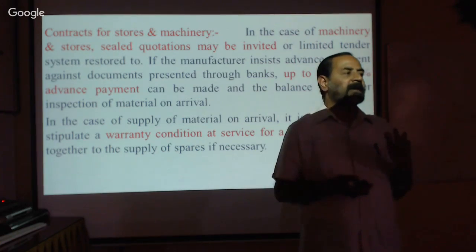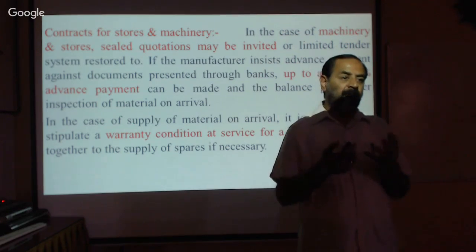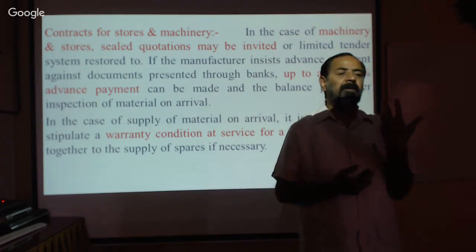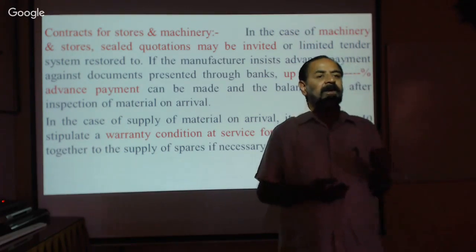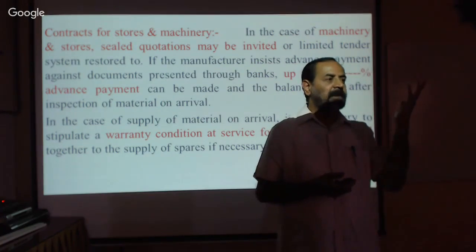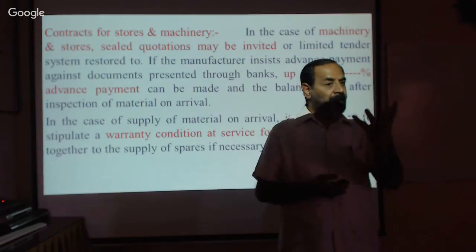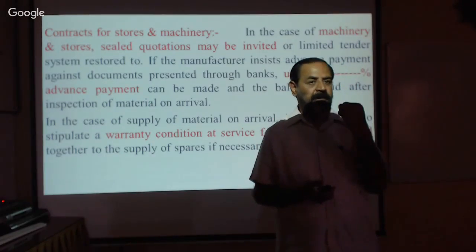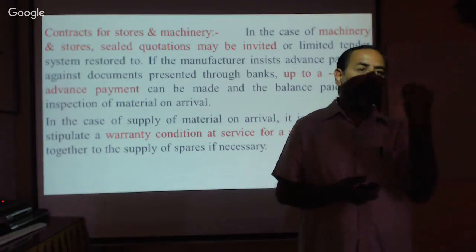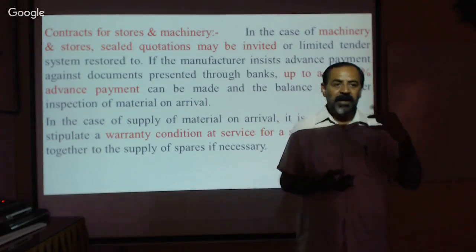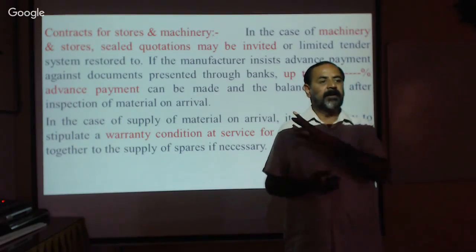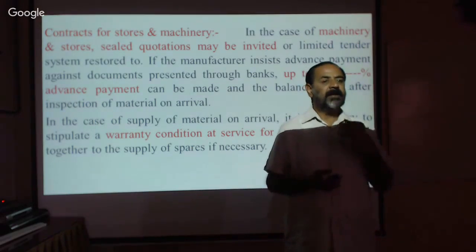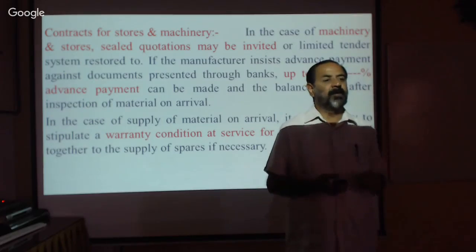Under those circumstances, let us be very careful as a project manager. Follow the method. A contractor cannot supply material not available in the market. If it is available elsewhere, then how to proceed? We must invite the tender quotation. Invite the quotations, go through the details of the machine or the material, find out through other people and acquire the knowledge. Then you can place the order to buy, isn't it?